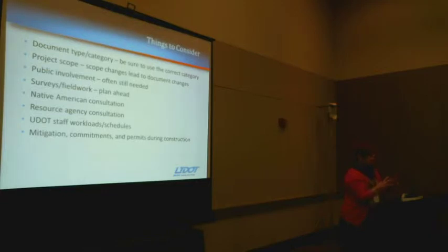You can build that into your project description. You can say, based on final design, these other elements might get added in based on field conditions. We might decide to replace guardrail. And if you don't do it, you're fine. But if you do it and you didn't account for it, you'd have to change your document. So just something to consider to make it a little bit easier for yourself.